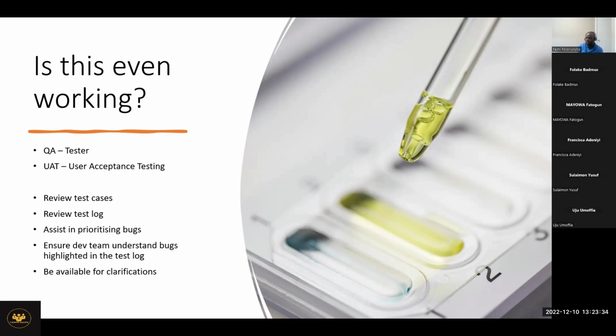So we walk them through that, and we also confirm the access. The application is in a UAT environment. Again, not to sound too technical, but within the UAT environment, we're confirming the access. So we have 15 people who are going to conduct UAT. Do they have the access to the application? Are they able to log in based on their roles? So we confirm all this in our UAT kickoff meeting to ensure that the UAT will start seamlessly. Everybody has the right access to the application and they will not have any blocker when they conduct their testing, and they are aware where they should put their test log, where they should be putting all of the information once they are doing their testing.